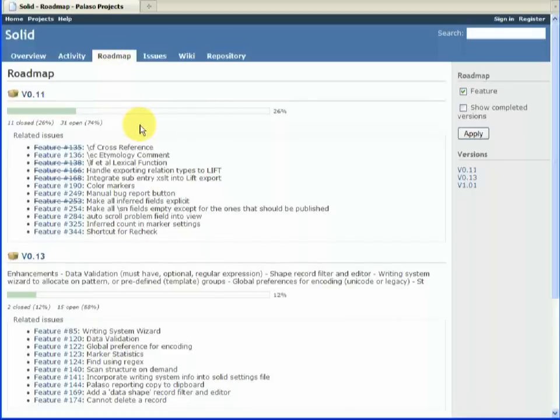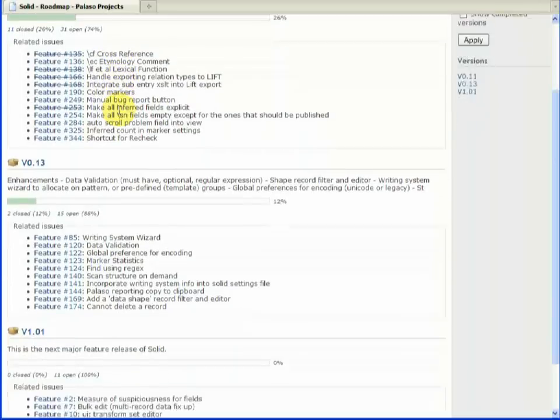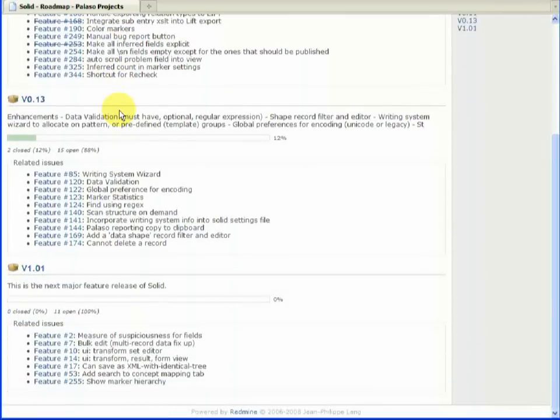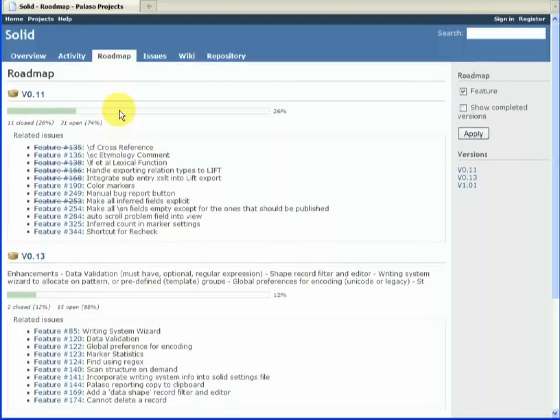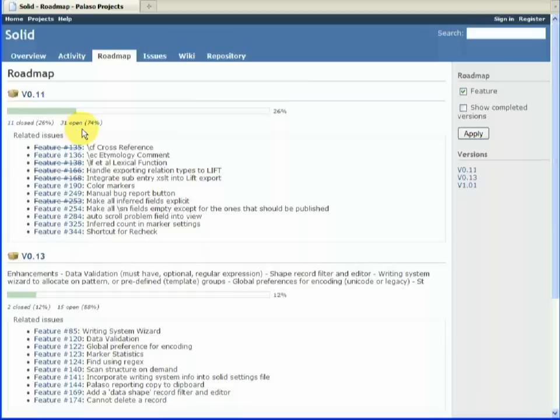In the roadmap, we can see a number of versions that are planned. And we can see how far through we are. Like here we see we've got 11 closed, 31 tasks still to do. So we're about 26% of the way through.